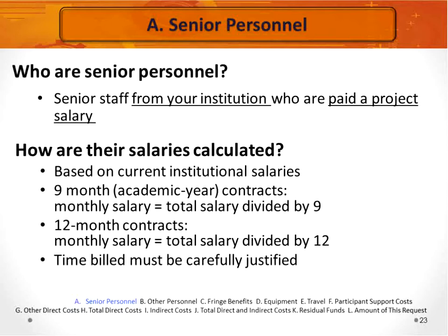In general, those in senior personnel roles should be getting some financial support to conduct the work of the project and help ensure its success. However, if you have a person serving in a senior personnel role who will not receive money from the grant, the individual should not be included in the budget. Do not include anyone for whom the budget entry will be $0 for that person. Stated differently, every single personnel named in the budget should be associated with a dollar amount.